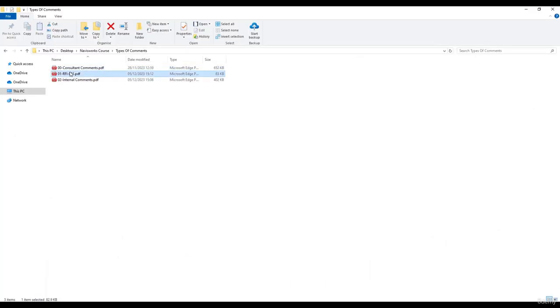The second source of comments is the RFI. What is the RFI? RFI is the abbreviation of Request for Information. It's a construction document to request clarification about documents, drawings, specification, or other project conditions. So as a contractor, how do we use it? For example, we are working on the modeling of plumbing systems, and we found that there are no sizes on some plumbing pipes on the design drawings. So we send an RFI to the designer to ask them about the sizes.